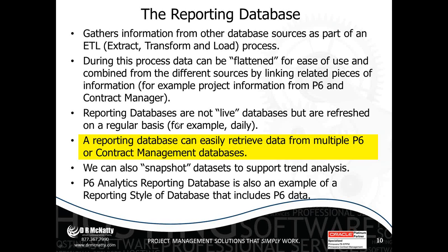We can also snapshot databases to support trend analysis. What that is, let's say that we pull a complete set of data weekly. We don't just override. We can keep saving it from week to week or month to month or whatever periods you're using. And that allows us to do trend analysis in some of our reports and graphics.